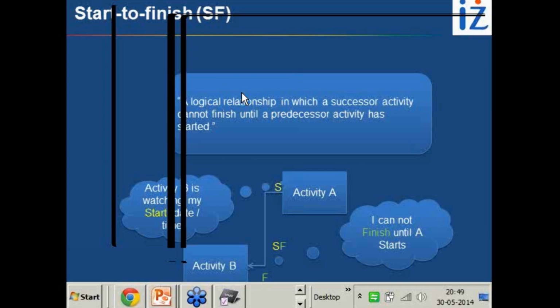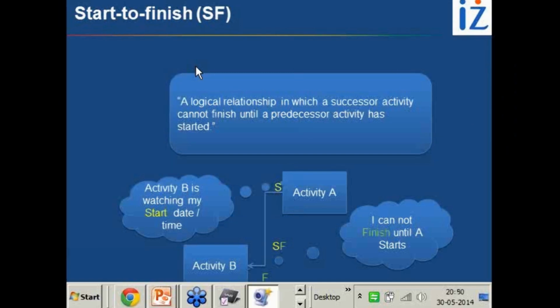Even though B is getting performed in the timeline before activity A, it still remains the successor because it is dependent. The successors are primarily the ones which are dependent. So since it is dependent, it remains a successor. A still remains a predecessor and B still remains a successor. But you don't have to worry that much for the exam. The exam will give you a situation, and the only point you should remember is that B is the one which is bounded by the condition.